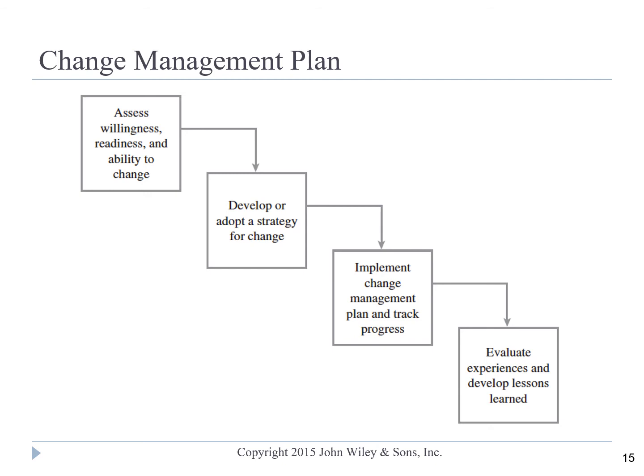Like most other plans that we have talked about, you first start by assessing the willingness and the readiness and the ability of the organization to deal with change. How big of a change is this? And then accordingly develop or adopt a strategy, or sometimes maybe a combination of strategies, for dealing with the change.